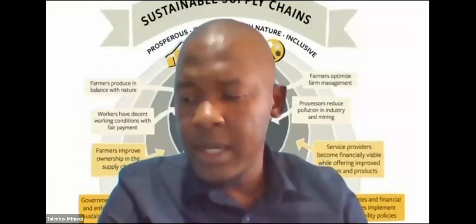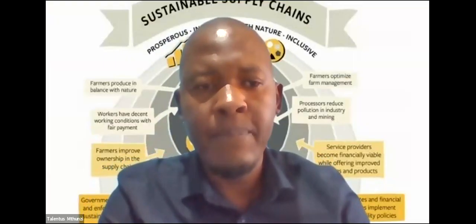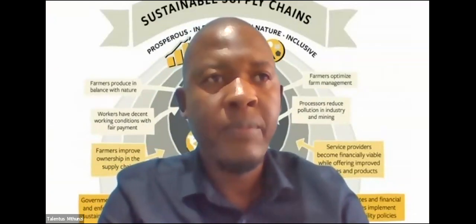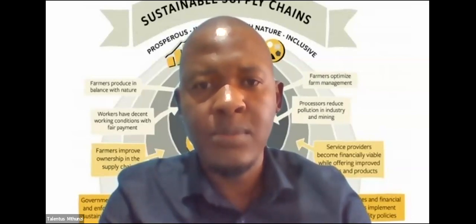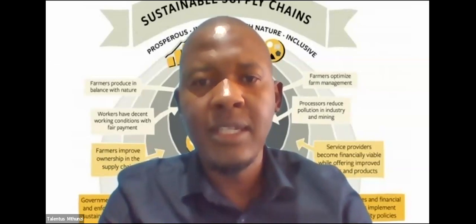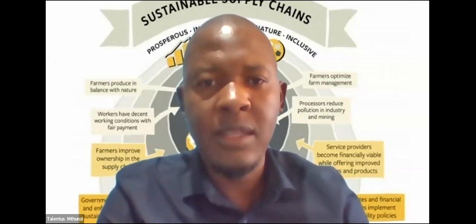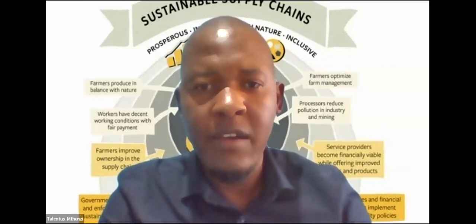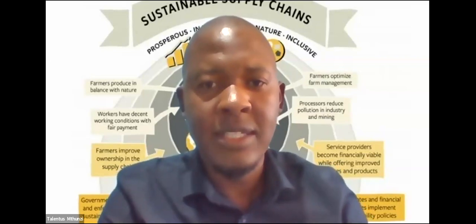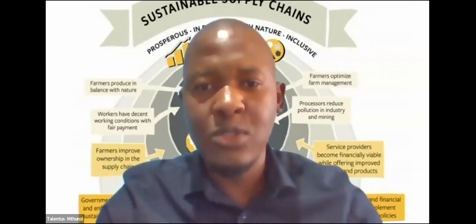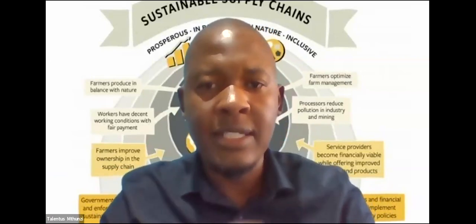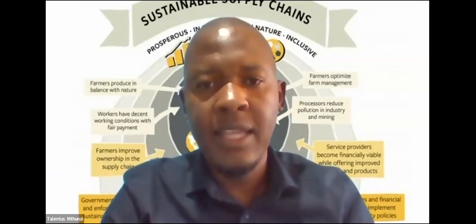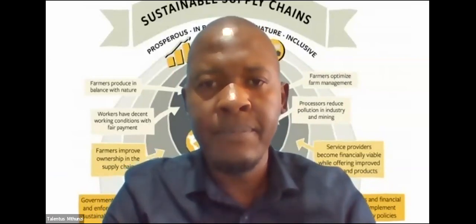Thanks. So I think one other important aspect is not falling into the trap of developing a lot of indicators to try and measure success. I think you need to be as focused as possible. Identify the strategic indicators that will tell the story about the project. The more indicators you have, the more resources you require to collect the data, and the more you are going to be spread too thin in terms of your analysis. But if you focus on strategic indicators that tell the story of the project and they are linked, then it enables you to really effectively monitor and evaluate your programs. Thank you.